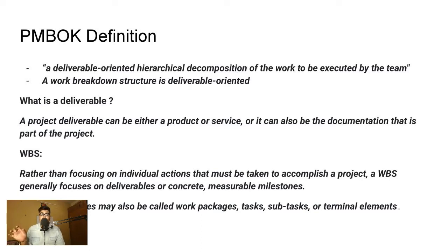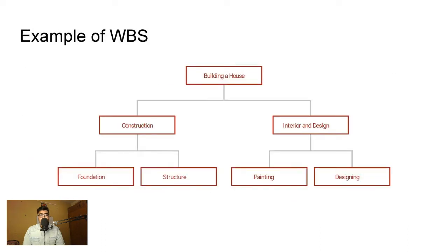It's a hierarchical decomposition. So, what do they mean by a hierarchical decomposition? For that, if you take a look at this particular example, it will provide you a clear picture. From this example, what you can understand is the project is building a house. And what we're trying to do is further divide it into or decompose it into small segments so that it can be easily identified, planned, monitored, controlled, and worked upon.